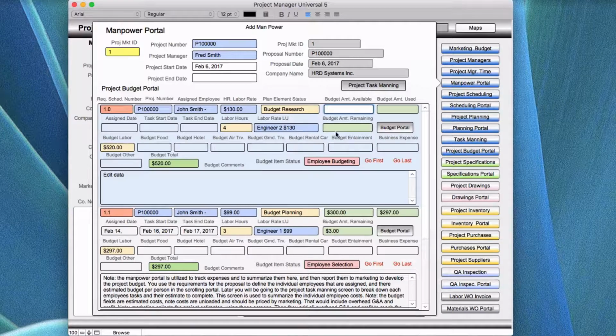Then you have all these elements, like you could have the budget remaining based on the hours that you used. So imagine if I put in here a budget, I know that it costs $520, and maybe I put in $560 as far as the allocation. And it comes down here and says there's a full $560 left. But if I now do $520 worth, and the amount used was $520, I had $40 remaining. So you can see how the math is calculated within the screen here.